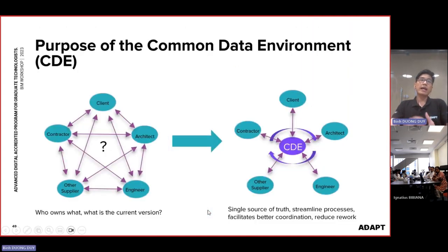The idea of the CDE is, in the traditional way, when stakeholders were sharing or exchanging information, they did not have any platform, so they shared it directly between two stakeholders. That could bring a lot of issues and questions, like they don't know who owns what, and they don't know which version they are using. But when we come up with one platform, all the stakeholders can access one single source of truth. We always get the same, latest information, and are able to check the information. So the CDE comes with that idea.